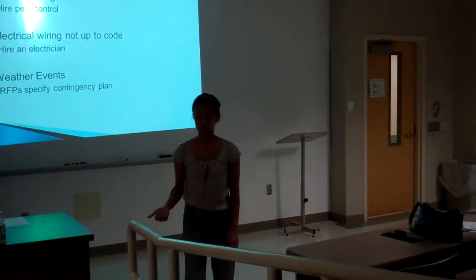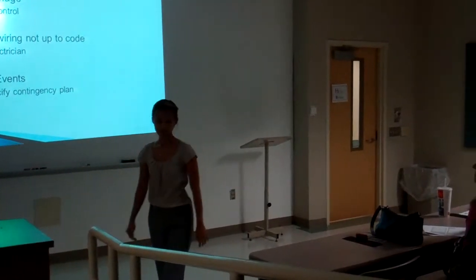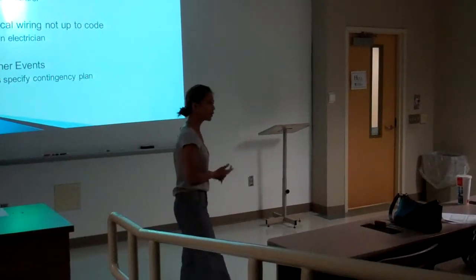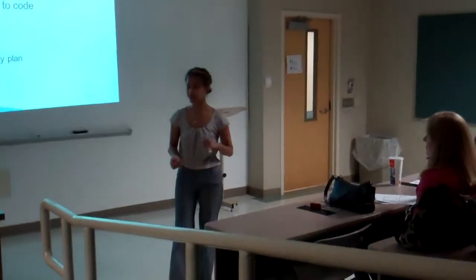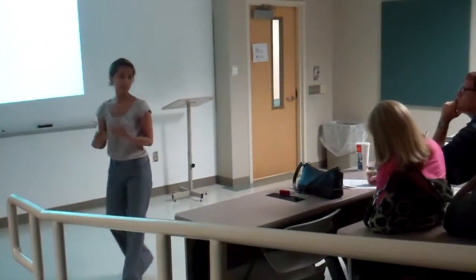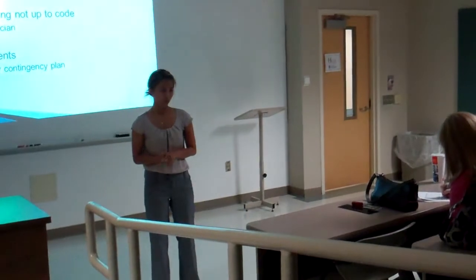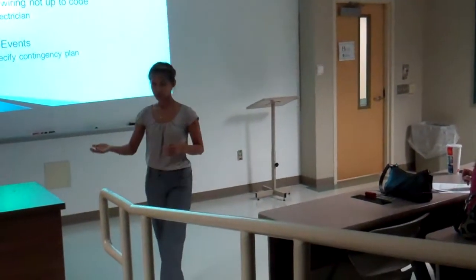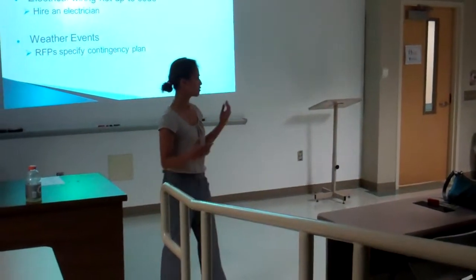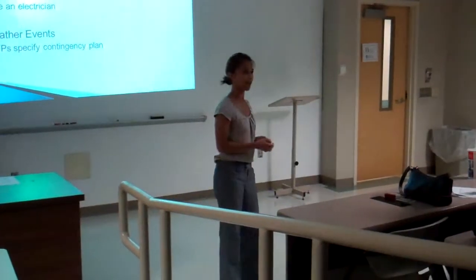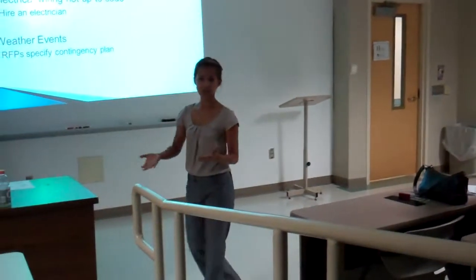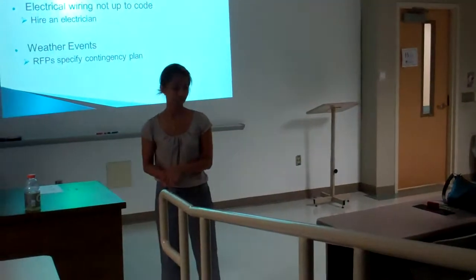Now, during the removal of the walls inside, there may be some further damage that can affect the scope or the budget of the project. Now, these risks, such as termite damage, is going to be minor damage. We will hire pest control to eliminate the damage. And we may also find some electrical wirings that are not up to standards. And for this risk, we will hire an electrician to bring up the wire to standards.